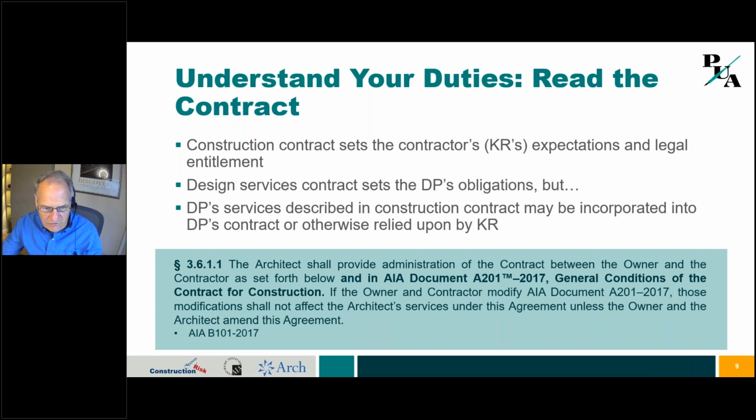And then the design services, the contract sets the designer's obligations. For example, you're going to see later on in my slides, I'm going to be talking about site safety visits. Well, are you going to be inspecting the project or are you reviewing it? And what do you have to do during that process? If you're not careful with that language, a court could very well tag you for failing to see a contractor error and failing to tell your client about it. So you need to be careful of that type of wording.